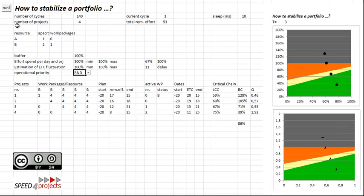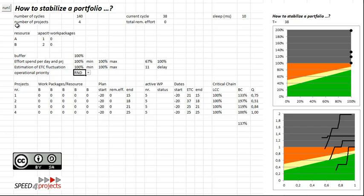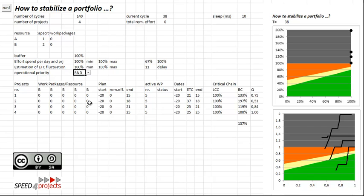Let's have a look at what the portfolio looks like. You see the points are moving around, and they will finish, but the green will get into red and all the others will get even more red. That is not stable. It's completely unstable, and that's clear because the constraint is two resources and there are four projects.